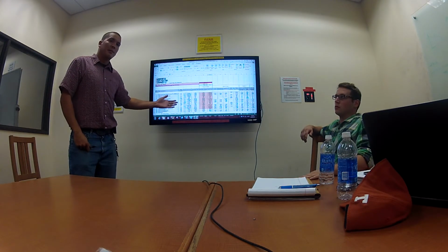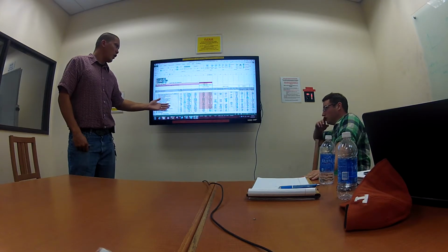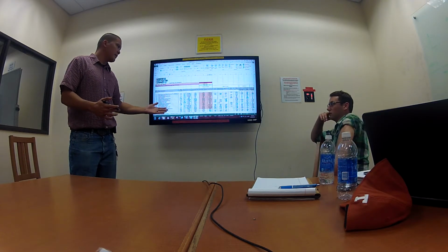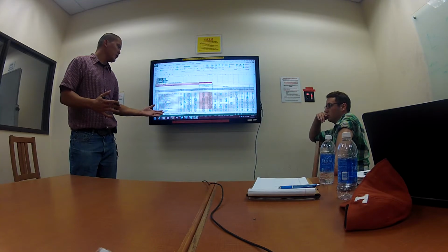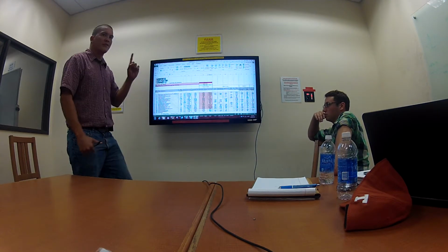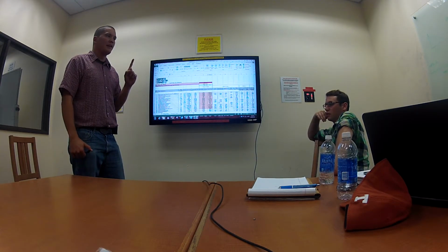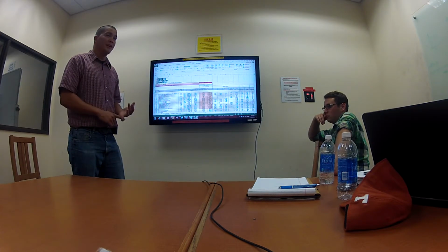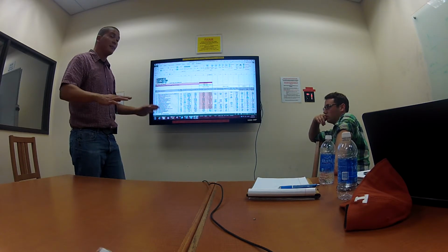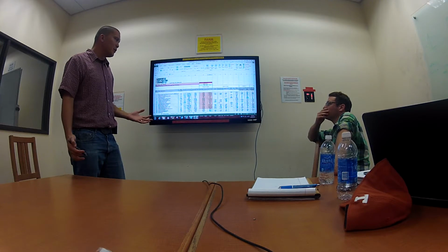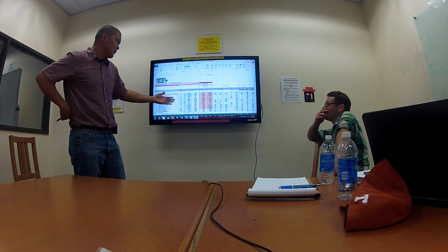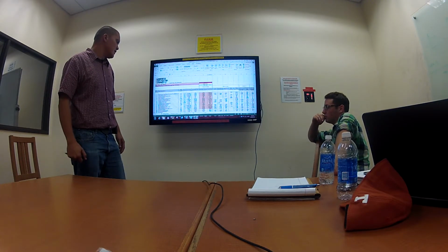Some lump sum items that you don't think are going to change, or that you're not going to want to change. You always want to leave one lump sum item open in case you have one big cut and one big add, so you can make a change in that. A lot of times that's mobilization that you leave open, but there are other high price lump sum items you can leave in there.